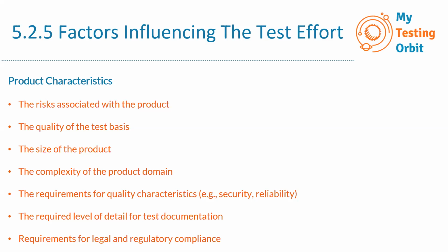Now these are the test activities, but of course there are some other things as well. For example, if you have to set up a test environment, then the test effort should be estimated for that as well. If you have to prepare test data, and on top of that, you should also allow some buffer in your test effort estimation for multiple cycles of testing.